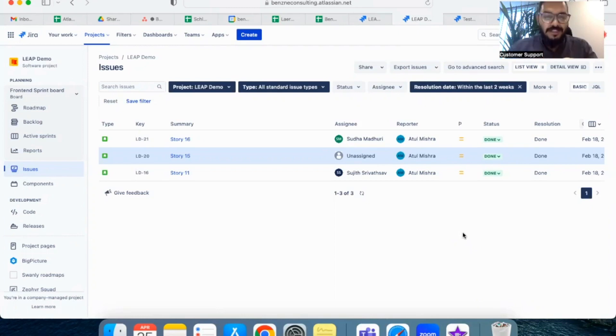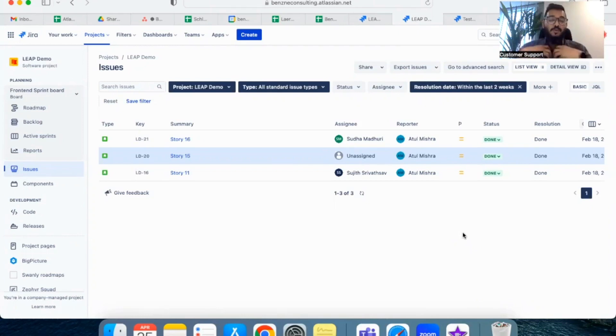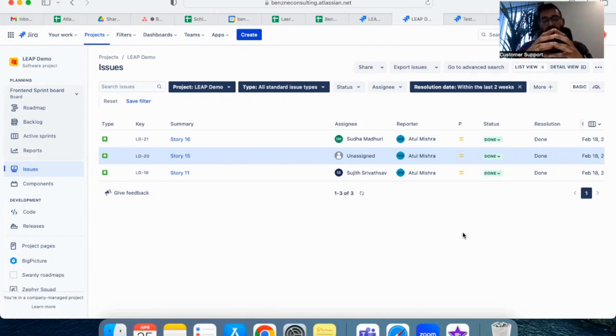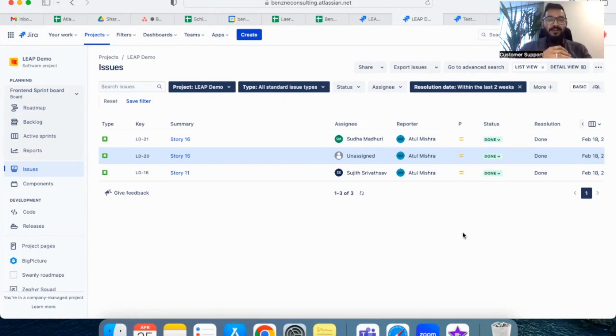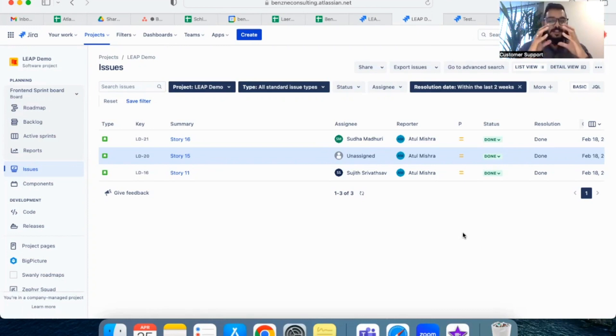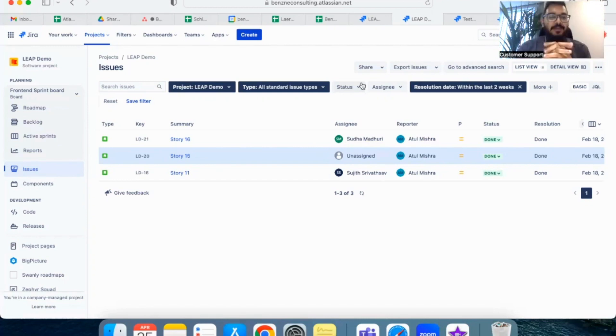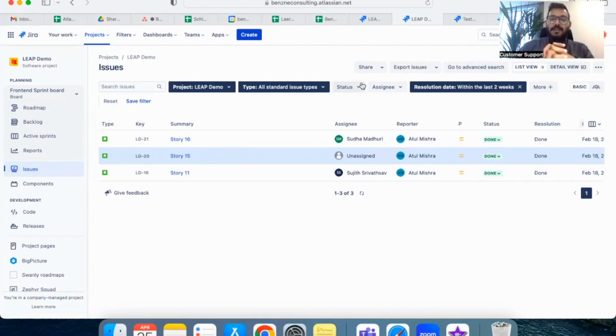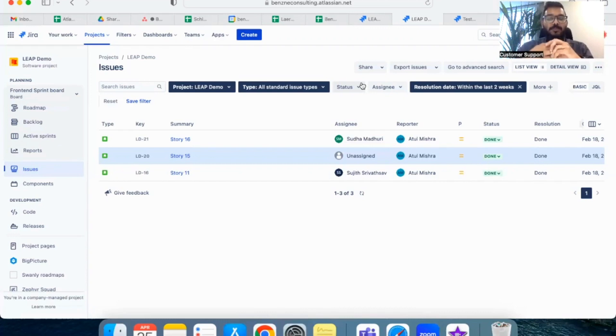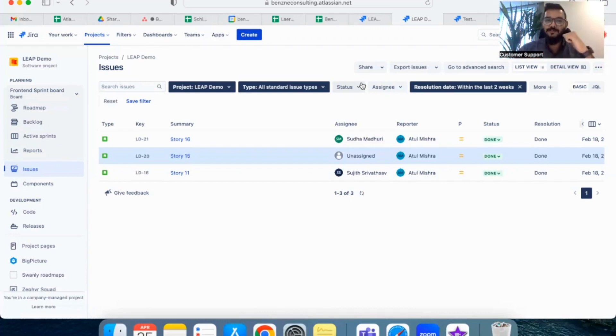So the first step in fetching the report is to create a filter. Let's take a scenario that I want to fetch a report of how much time each member in my team have spent in last sprint. So let's see how we can fetch this. The first step, as I told you all, is to create a filter. Here in this example, I have created a filter to fetch all the work items pulled by my team in the last two weeks, that is the last sprint.